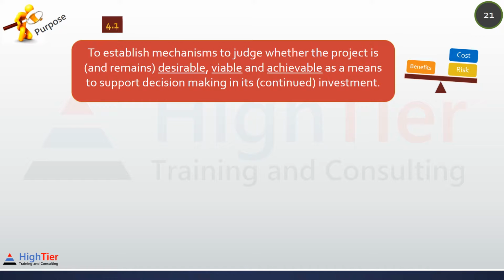Even though the benefits of being involved in Olympics is very high, as a contractor, if you cannot deliver this project within the constraints of time, you should not take up this project. There are very strict clauses in the contract, and if you don't deliver on time, you may be penalized. And it may undermine the very rationale for doing the project in the first place. The question to ask is, is it possible for us to do it?